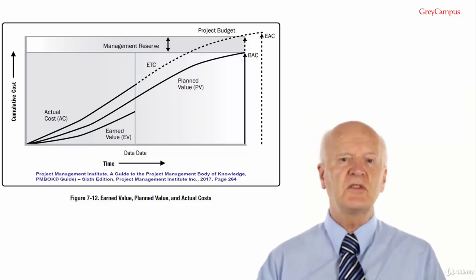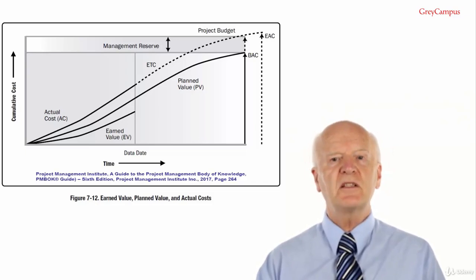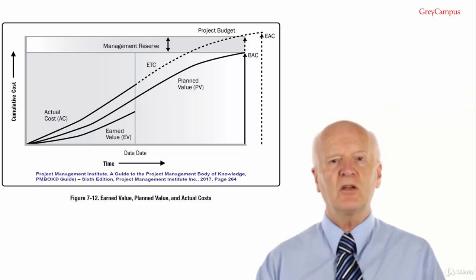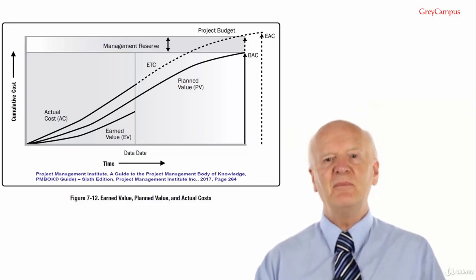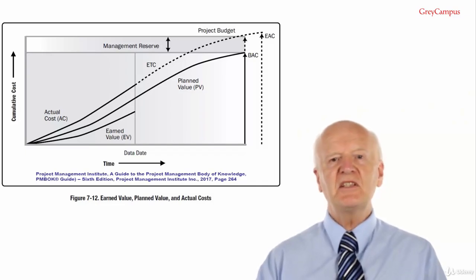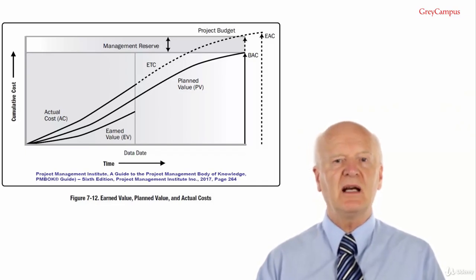When actual performance is unfavourable, the assumption that future performance will improve should be accepted only when supported by project risk analysis. Equation: EAC equals AC plus BAC minus EV. EAC forecast for ETC work performed at the present CPI.